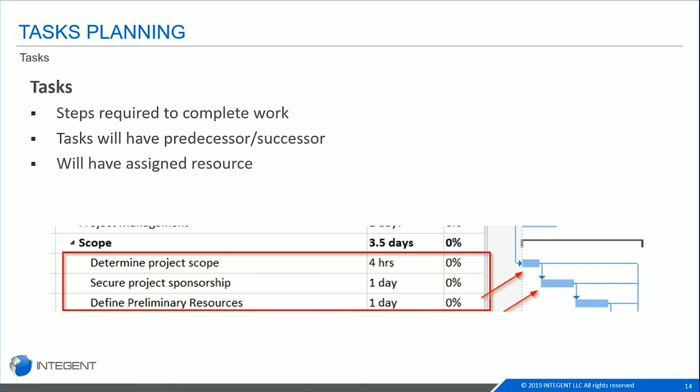and so you can see in the example here, those tasks are subtasks, they're indented underneath that summary task above it. And then off on the right-hand side is where you do get that Gantt. Mine are blue because they're set to automatically schedule, but it'll give you that Gantt, the bar over there to represent the duration, and also the arrows to represent the dependencies.